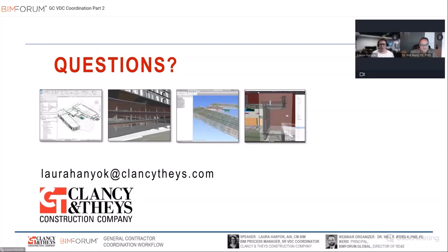So when we're doing those constructability reviews, like when we look at mechanical duct, we always have to make sure... there was a case recently where it was going to be really tight below steel, but they don't have insulation modeled. So we have to make sure that we are accounting for that. And I think the bigger thing too is just in design coordination. We see that one come up a lot, not allowing for adequate room for duct with insulation, especially in really tight areas. Right.